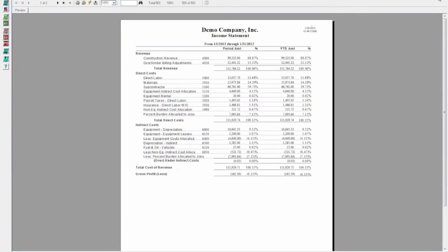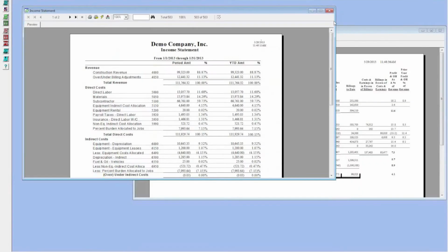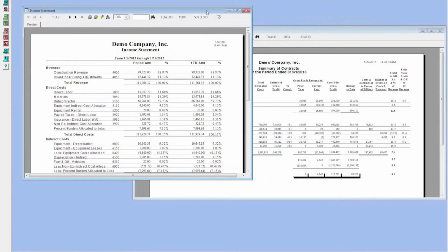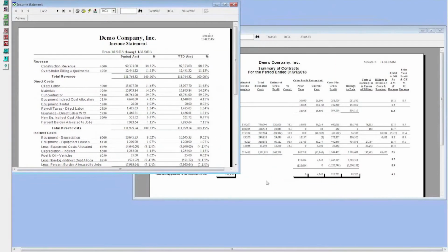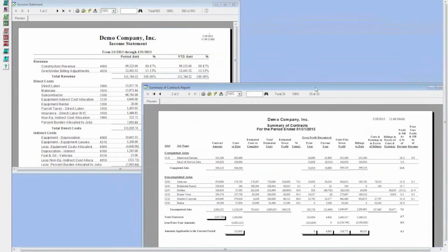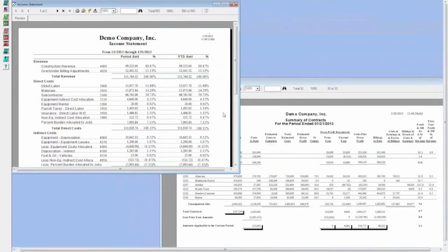I mean, your over and under billings might be perfect and everything might be fine, but what the bonding companies and users of construction financial statements want is to see the cost tie in here, and they want to see the revenue tie in here. And this will tie in if we accrue our over/under billings.